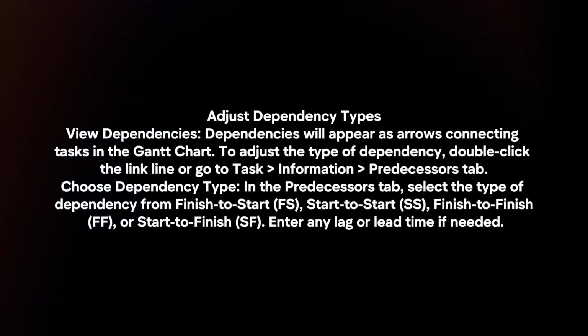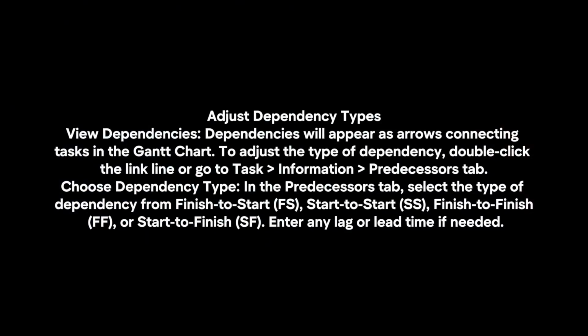Choose dependency type. In the Predecessors tab, select the type of dependency from Finish to Start, Start to Start, Finish to Finish, or Start to Finish. Enter any lag or lead time if needed.